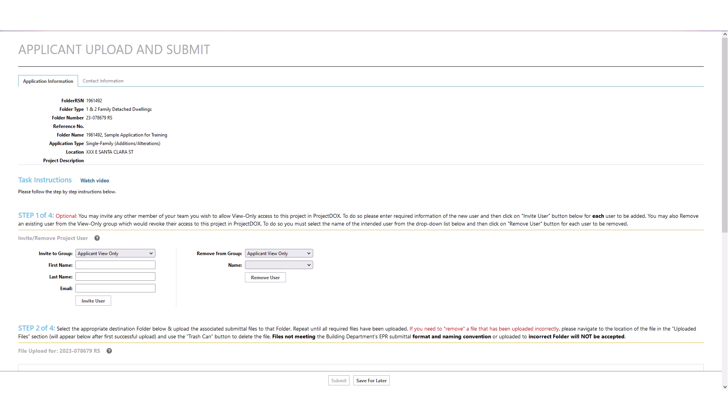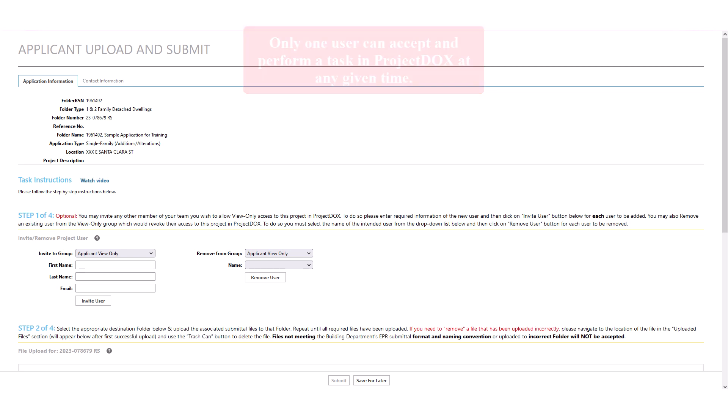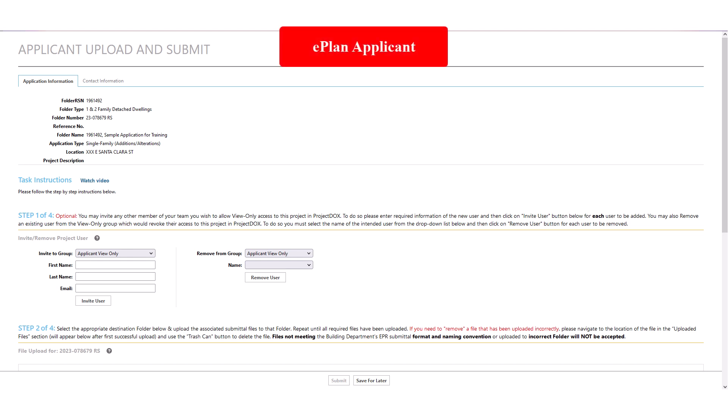Please note, only one user can accept and perform a task in Project Docs at any given time. All tasks related to plan review activities can only be performed by the user who has been identified as the e-plan applicant at the time application was created. The Upload and Submit task shown here would only be accessible to the e-plan applicant who is the member of the group called Applicant.